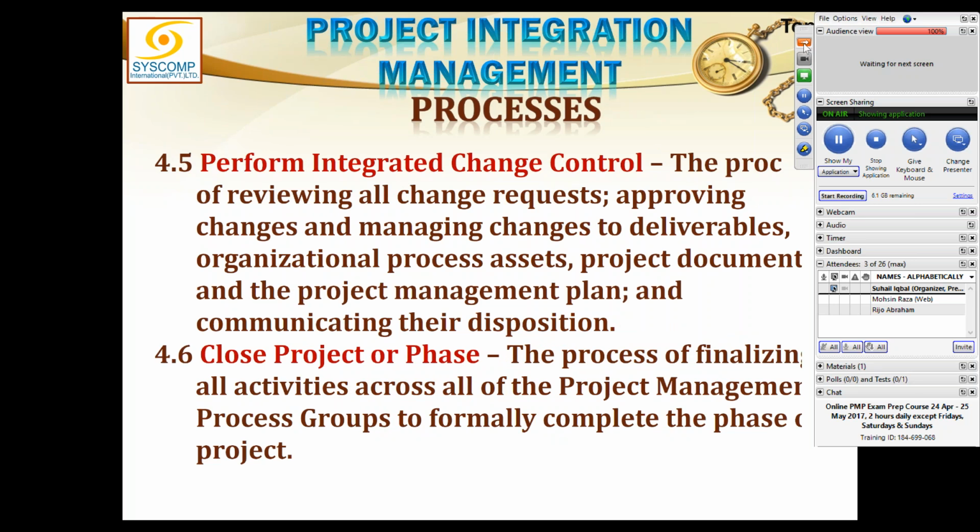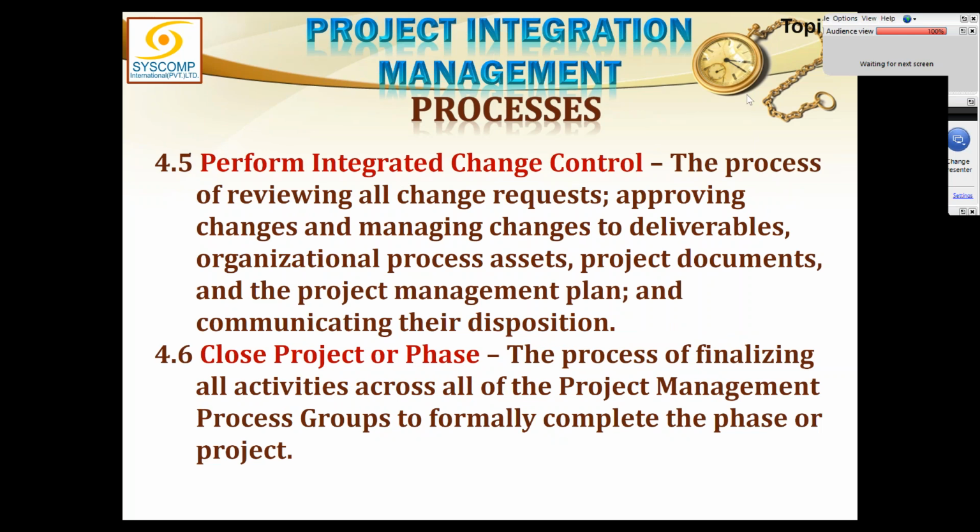Perform integrated change control is the other process of the monitoring and control process group. This process is of reviewing all change requests. All change requests are received by this process. Approving changes is its responsibility. Managing changes to deliverables is its responsibility, or to any update to the organizational process assets, or to the project documents, or to the project management plan, and ultimately communicating their disposition.